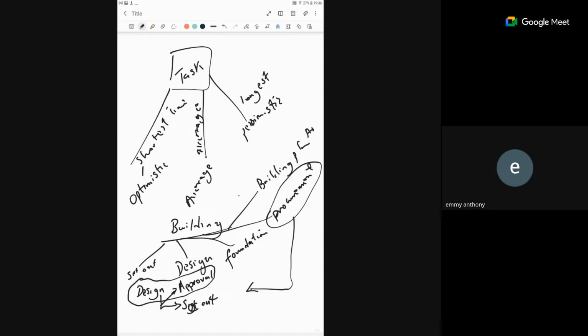In some situations, everything is ready. The staff have been employed, but you do not have the material procured. I've had a lot of civil engineers who will be saying that it is the material that is delaying us. For a very good project manager, or perhaps he is just a civil engineer who doesn't have the knowledge of project management. But if you have the knowledge of project management, you would never fall into that situation where you will have the project team waiting and the material is disturbing them. So you must have grouped before you even start the project: what are the things I can do together?